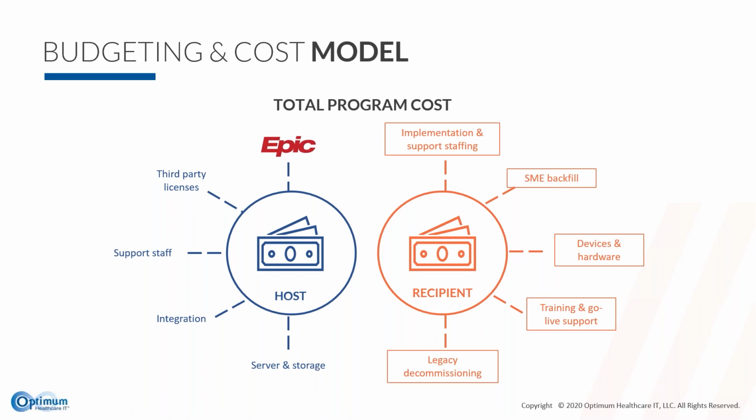On the recipient side, you also need to understand what costs there are that are going to go beyond what the host is going to charge you for the implementation and then for ongoing support. So this is going to include staff to implement and support Epic. There might be staff that you have locally that you might need to employ on the IT team or otherwise, on top of what you'll be paying the host for. It may also include some of your subject matter backfill time. So if you're going to be taking physicians, nurses, et cetera, out of their duties to come into design meetings, and eventually to come into training, then you need to think through, does that mean that we'll be hiring additional overtime to cover that?